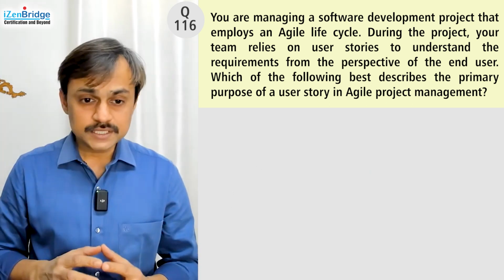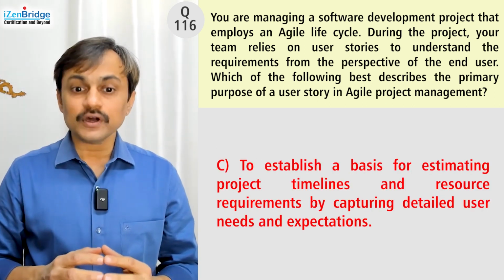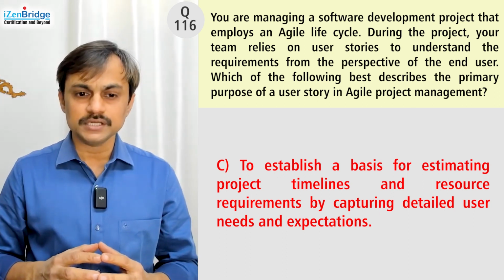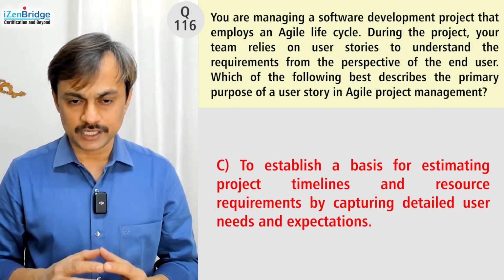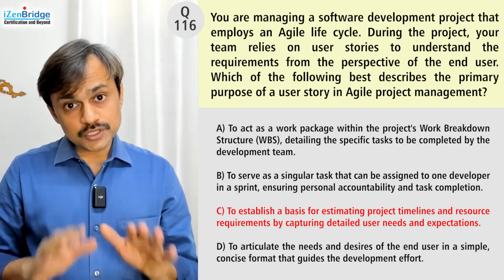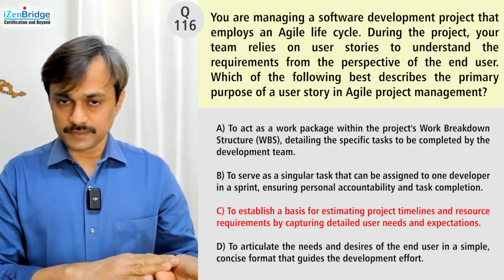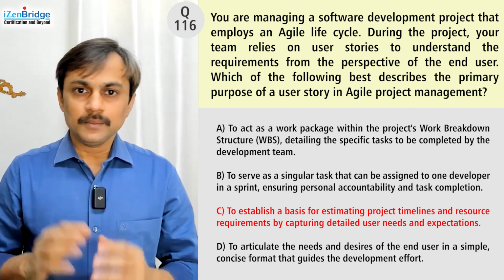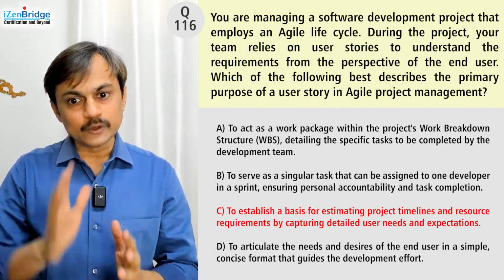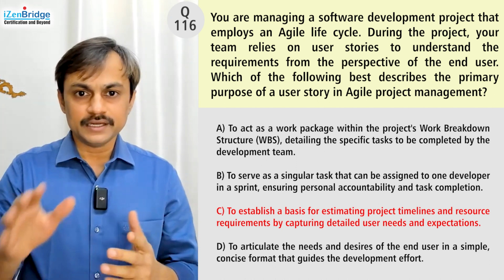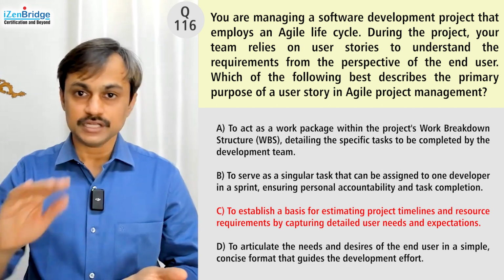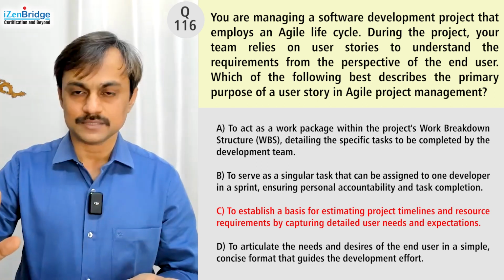Option C, to establish a basis for estimating project timelines and resource requirements by capturing detailed user needs and expectations. Yes, user story is used for the purpose of estimation. Yeah, it can be used for forecasting the releases, but it may not be used for calculating the resource requirements. And it is definitely not focusing on capturing the detailed needs and expectations. It is capturing the high-level needs and expectations.